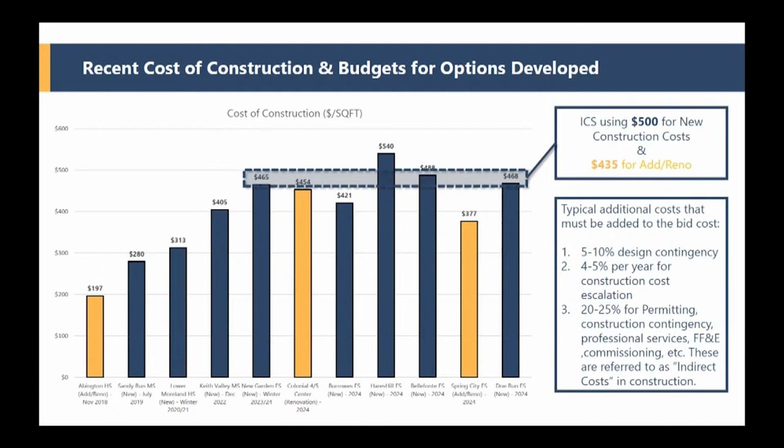You can see 2018, 2019, 2021, these are rising. All of these buildings here are 2024. Now we're in 2025, but you can see that the range in 2024 was about 460 to 500. In 2025, we're using around 500 as the correct number for dollars per square foot of a building.